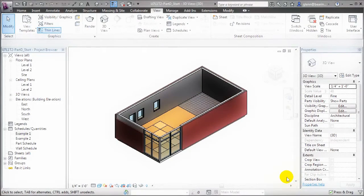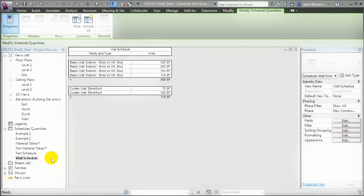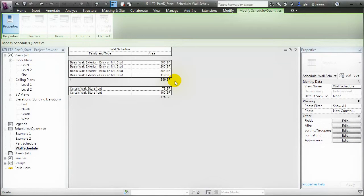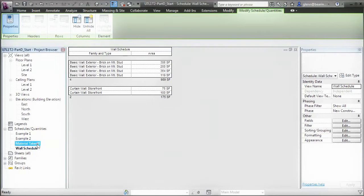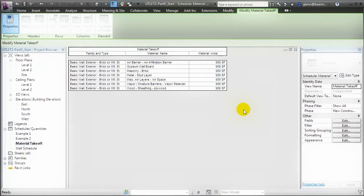One of the key advantages of using parts when construction modeling is the improved accuracy you get when scheduling building elements and materials. Let's open a typical wall schedule that displays a list of the different wall elements in our project as well as the areas for each — those elements are reported to have a total area of 989 square feet. An interesting question is where is that square footage accurately measured: at the inside surface of the wall, the exterior surface, or at the wall location line? If we look at a Material takeoff schedule, we'll also see the inaccuracy there — all of the materials across the different building elements are aggregated by material type, and the same material area is being reported for each of the different layers. The gypsum wallboard layer on the inside surface and the masonry brick layer on the exterior surface are reported as having the same area, and this is inaccurate.